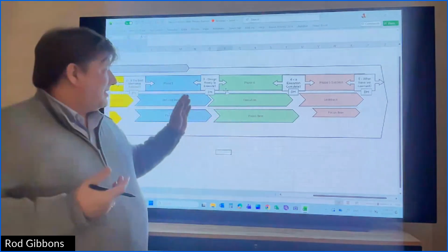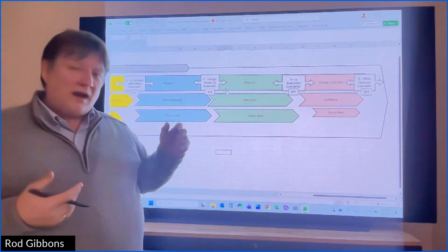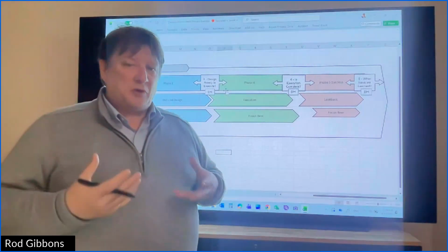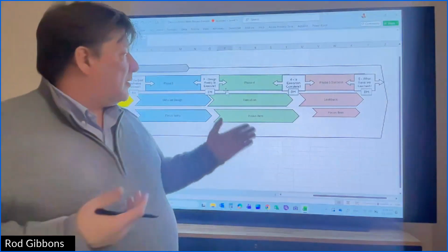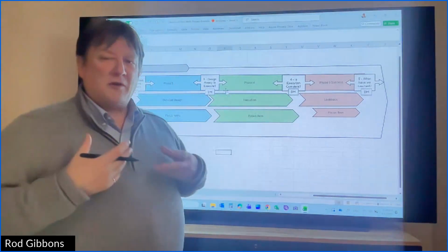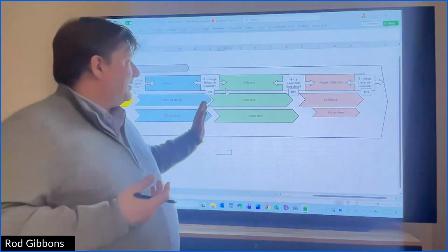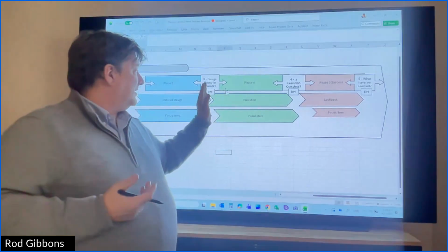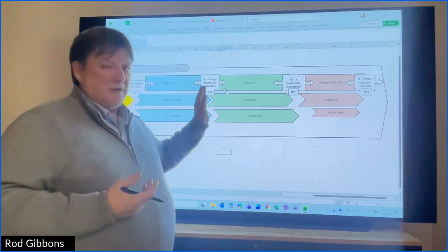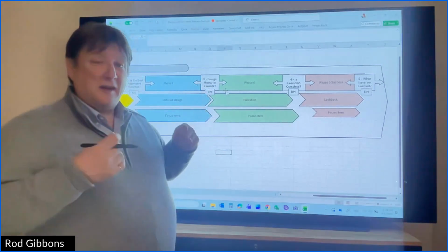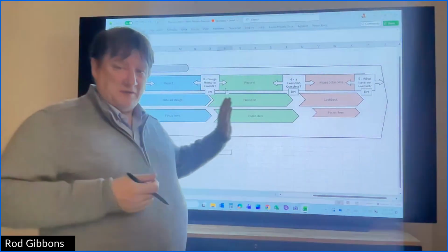So usually these earlier phases are people doing work, engineering work, getting ready. In execution, this is when you are really employing equipment, deploying capital. So the spend level goes way up here in phase, going from phase 3 to phase 4. So this would be normally accompanied by what's called the project AFE, because really this is the execution project.